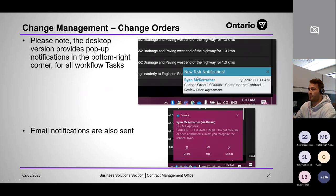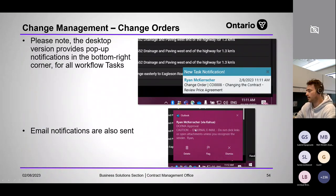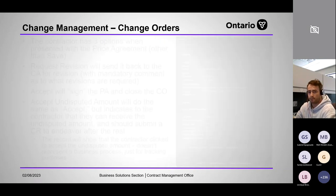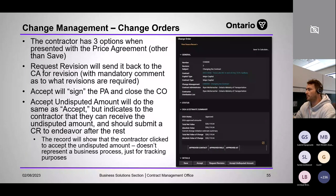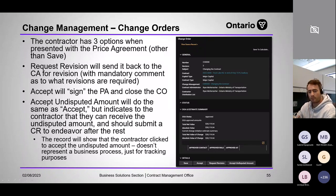Notifications are generated throughout this process: a small notification appears in the bottom-right corner of the screen, and a generic Outlook email popup also fires — for example, 'Ryan has sent a change order to me for DOFMA approval.' Anyone with an active workflow action receives these same notifications. Once the price agreement is presented to the contractor, they have three options: request revision for negotiation or corrections, or accept it — equivalent to signing — completing the process.